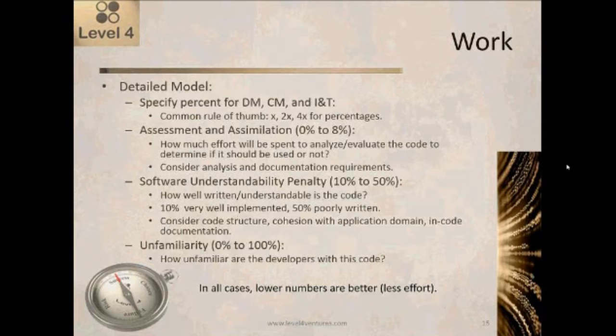and so on. I also, if I'm dealing with very large quantities of something, I'm likely to be moving to the detail model. So if somebody tells me, well, you know what, we're going to have to test 1,000 pages, I'm likely to want to use the detail model for that, just because when you use the other models, you're going to end up getting approaches and efficiencies and so on that you want to capture using the detail model.